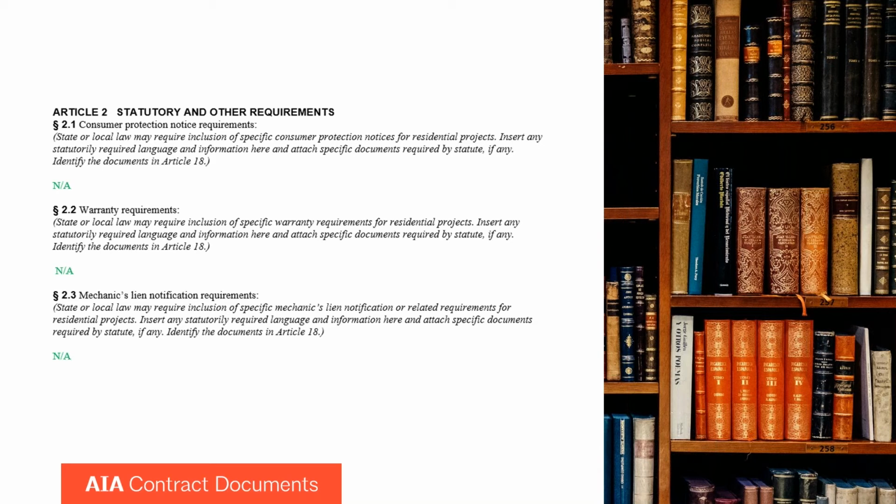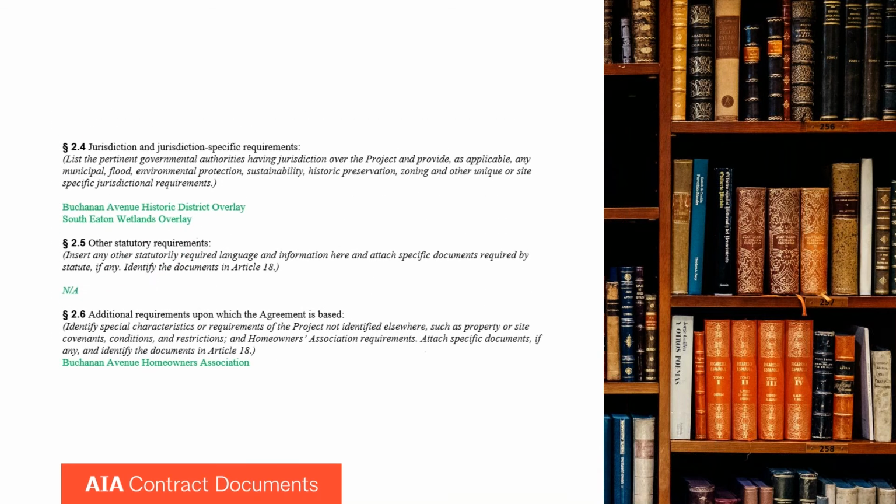But specifically, lien requirements are something that home builders are going to know about. And you need to follow the lien requirements in the jurisdiction where the project is. And so list those right there, because some areas actually say that you have to have certain verbiage in the contract itself.